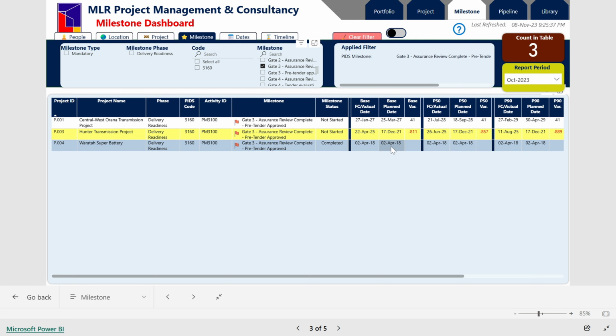And if you're asking, what's the meaning of this color here? Why is it clear here? Why is it yellow here? Why is it blue here? The meaning is basically the default color in Primavera. When the activity is completed, it's normally blue bars, and here the yellow is for the 2 month look ahead. So if the milestone is part of the 2 month look ahead, it will be highlighted in yellow.